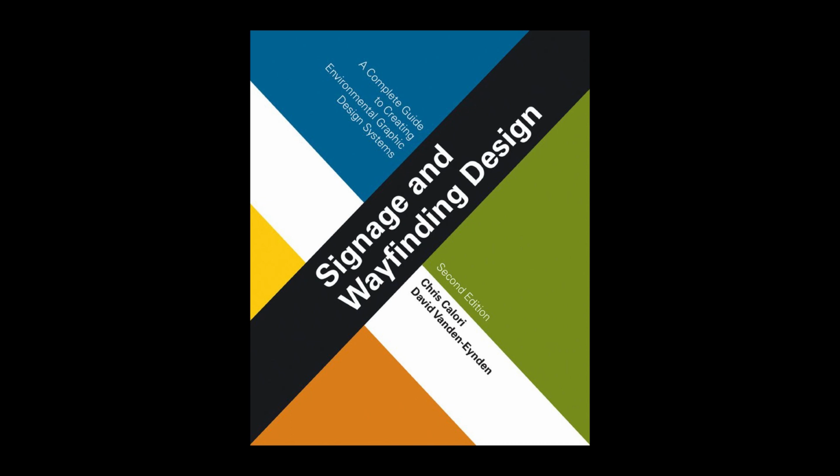In the fabrication/installation observation phase, subsequently referred to here as observation, the designer reviews the fabricator's work and progress for technical conformance with the design intent, while the contract rep administers the overall mechanics of the contract, such as payment schedules, time schedules, coordination of signage with other trades, routing of project communications, and so forth.